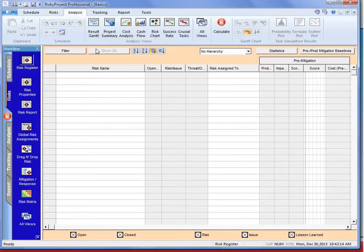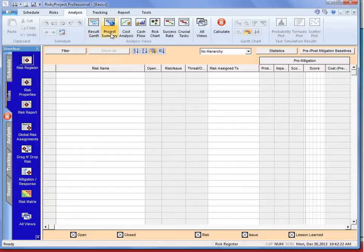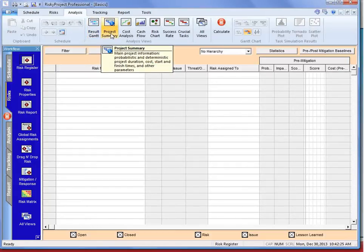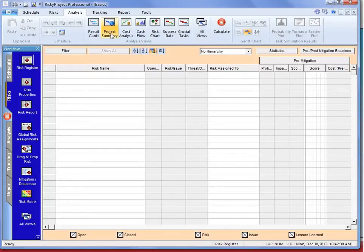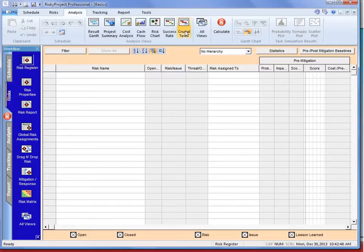We'll then move on to the analysis, which includes a result Gantt — a visualization of the simulation results as a Gantt chart — the project summary, which shows the overall results of the simulations including the project with and without risk, cost analysis, cash flow, risk chart, success rate, and crucial tasks, which is basically the critical path in a probabilistic setting where we monitor how often activities land on the critical path.